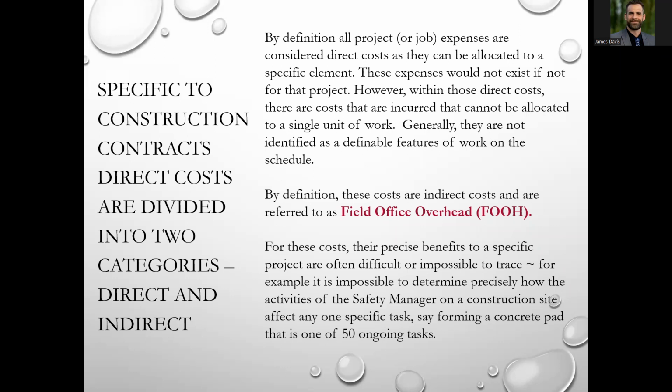So again, you might have a janitorial supervisor. They want to add a room. You don't know how much of that supervisor's time is dedicated just to that room. So you want to come up with a percentage to spread those costs across the board. Okay. So that is very confusing for anybody new starting out as to how to bill those directs or how to get those in your cost proposals. Okay. So just be aware of it.